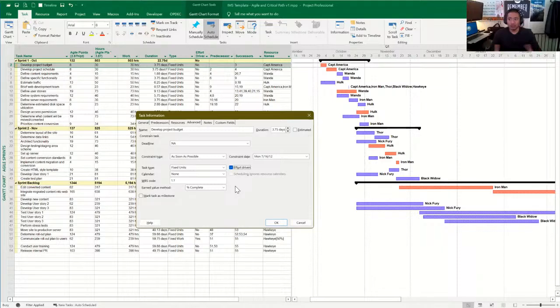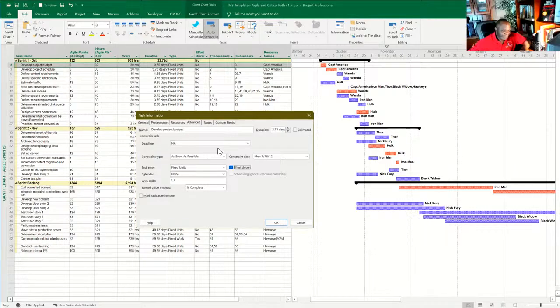Also, the other thing is I try to encourage using deadlines instead of leads and lags, because it keeps the critical path in shape. It doesn't hinder it if you use deadlines. Yes, that's correct. So this is a good one for Jim. Jim, your big project next year, instead of using some of those constraints, you could also look into using deadlines. So that could be a good tip.